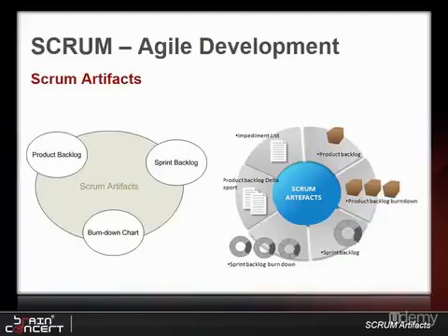Backlogs are goals for iterations and releases. They improve product utility and increase visibility by enabling high-quality feedback regularly as the goals are met and reviewed. However, they also decrease time to market because the prioritized list enables negotiation of scope and early release with the most valuable functionality. Backlog generally refers to an accumulation over time of work waiting to be done or orders to be fulfilled. A burn-down chart is a graphical representation of work left to do versus time.